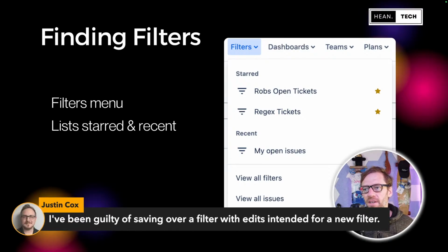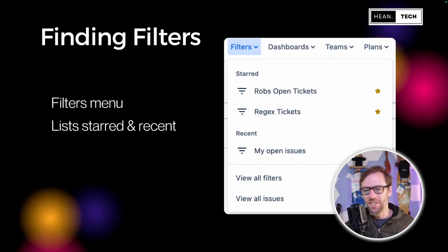Oh, Justin, my friend, why? What Justin's referring to here is if you have a filter that works, you'll sometimes modify it. Best practice is typically to copy it and save that new copy as the updated filter. And that will preserve the original. And the importance there is you have no way of knowing who is using that original filter. That link could be out in your organization and be the best thing ever, or it could be in a dashboard. And if you change that filter, you'll change it for everyone else. So that's another gotcha, another frustration that Justin is calling out here.